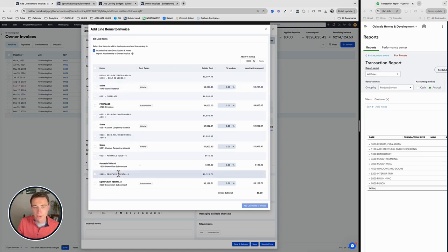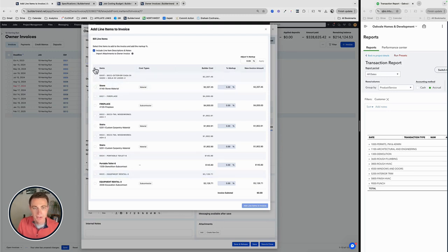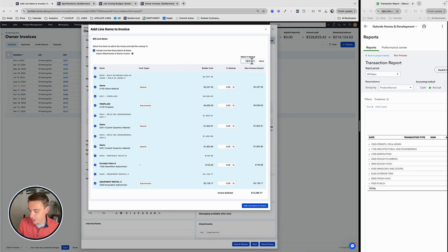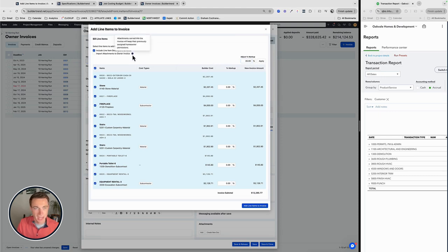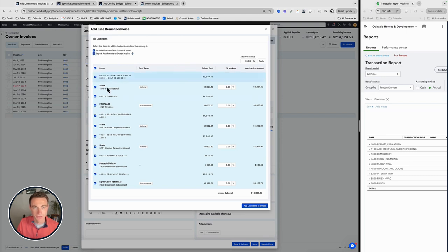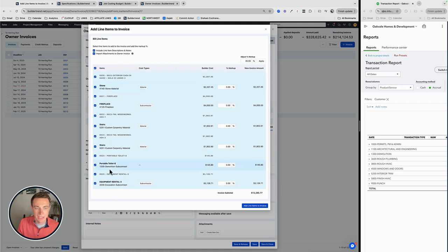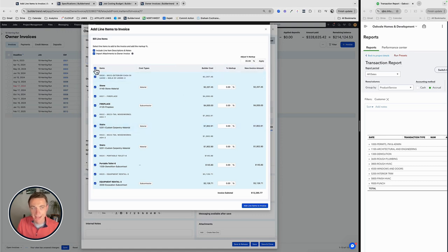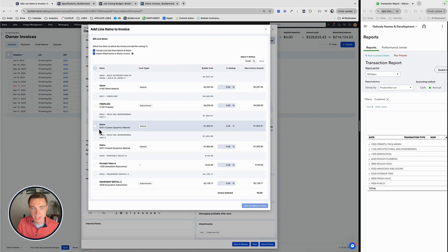So I have all my items here. Now I have a blanket 35% markup for this project for all materials and subcontractors. So I can take all of them. I can select all. And I can do a percentage. Now what I'm realizing here, this is new just as of today. I don't know if they've done this for a while, but import attachments to the owner invoice, that is a good idea too. So if you have receipts or estimates or any kind of documents stored in here, it looks like what will happen is they will be added to the invoice. And now here's my blanket markup. I can click this to apply it to everything.